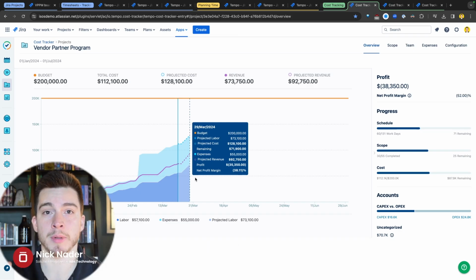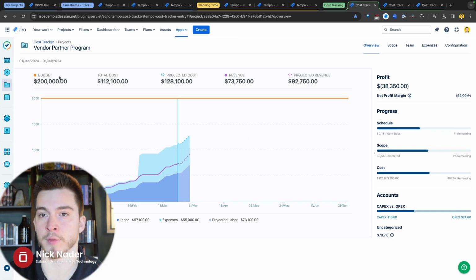And what we saw in the plan versus actual report was the utilization numbers on those plans versus actual time. So we know, hey, this is our average delta. Hey, we're off 8% based off of historical plan versus actual reporting. So we know this projection is probably plus or minus 8% in terms of variance and accuracy within our overview here.